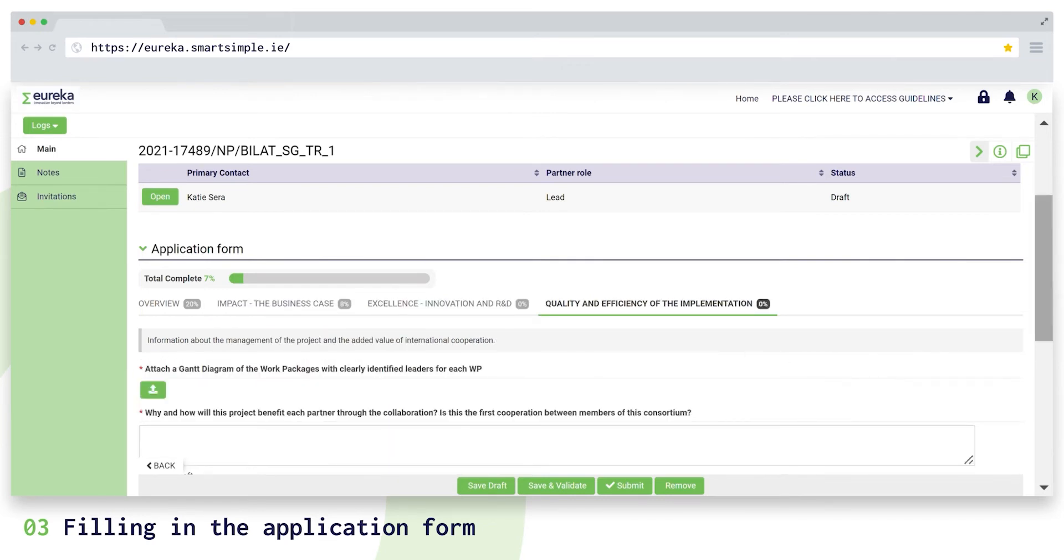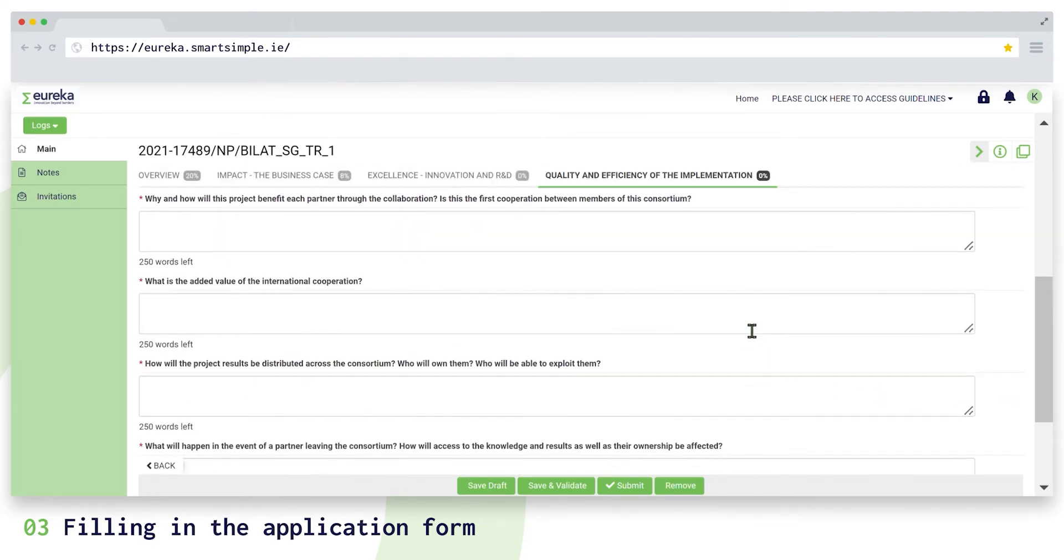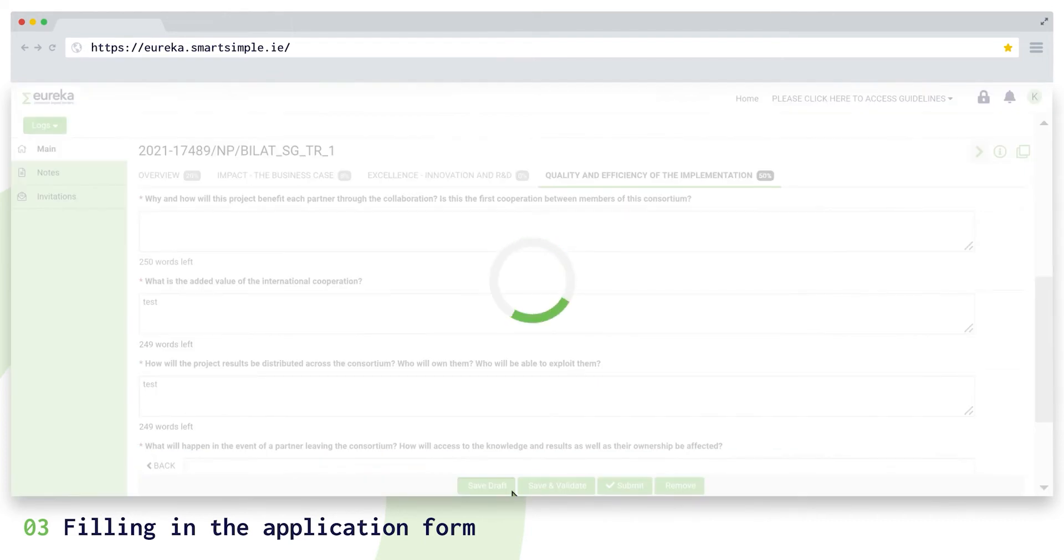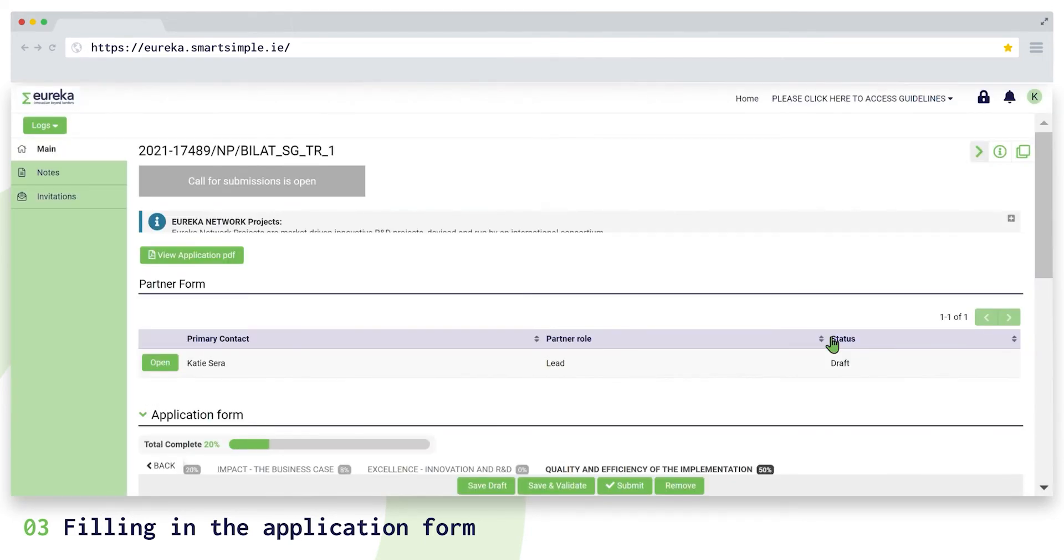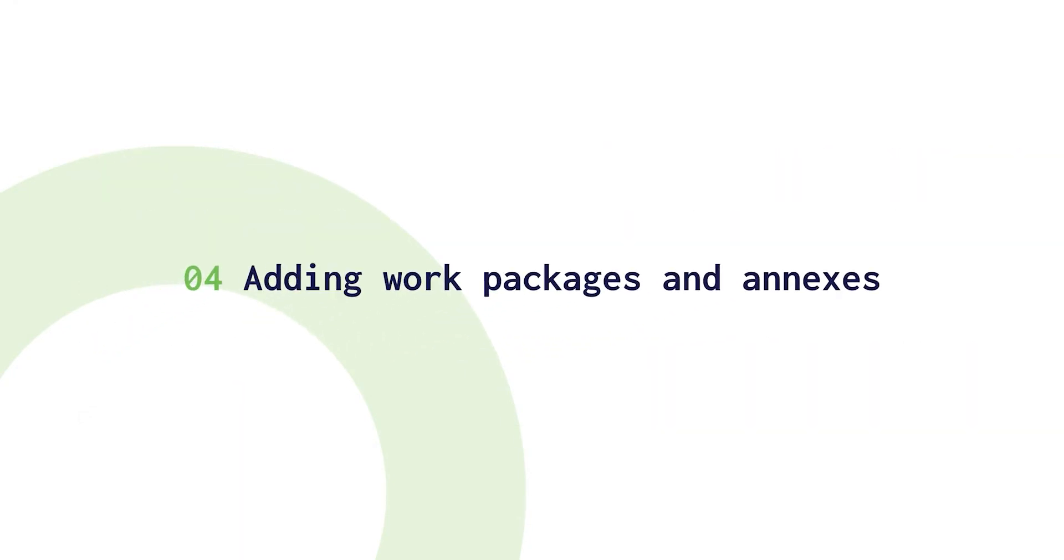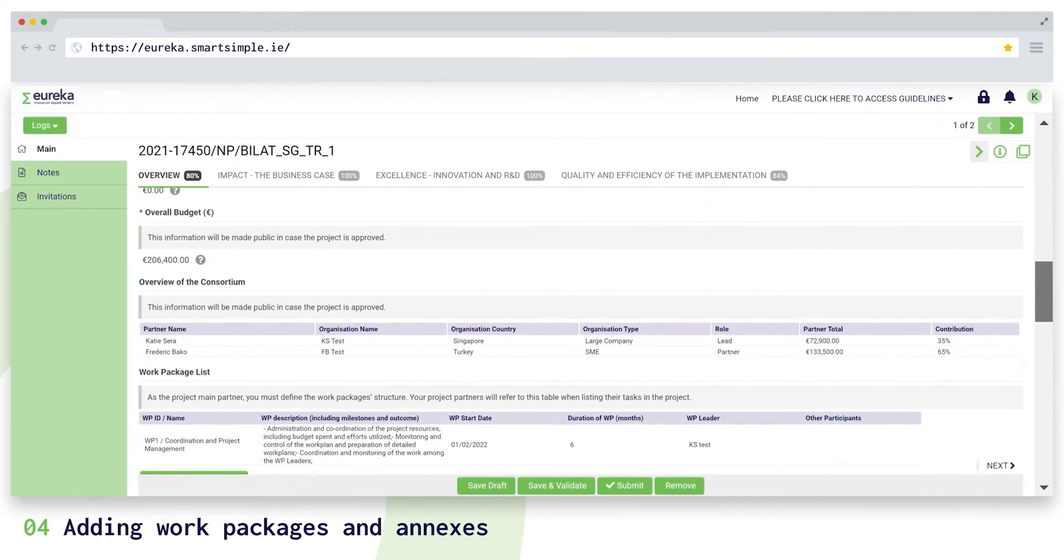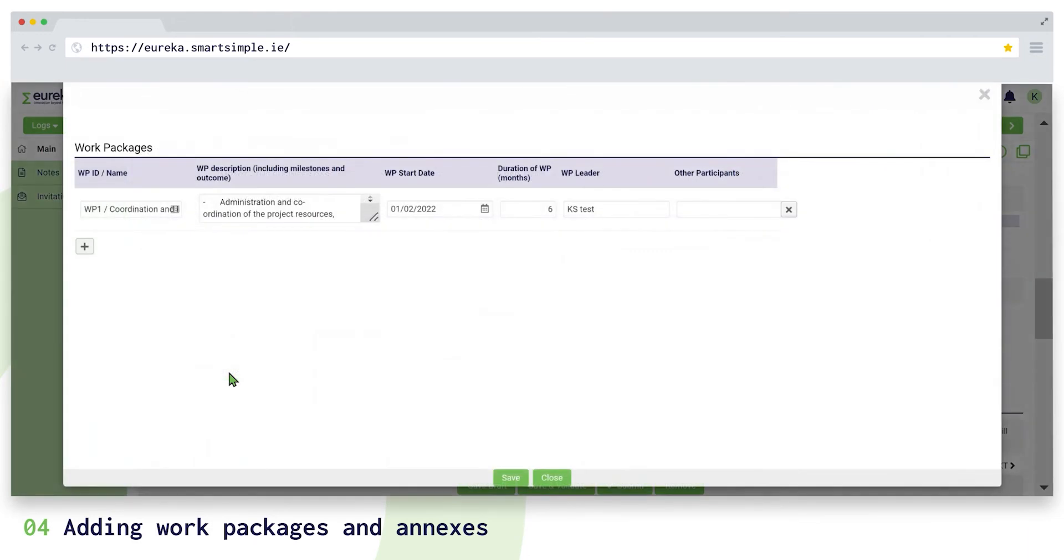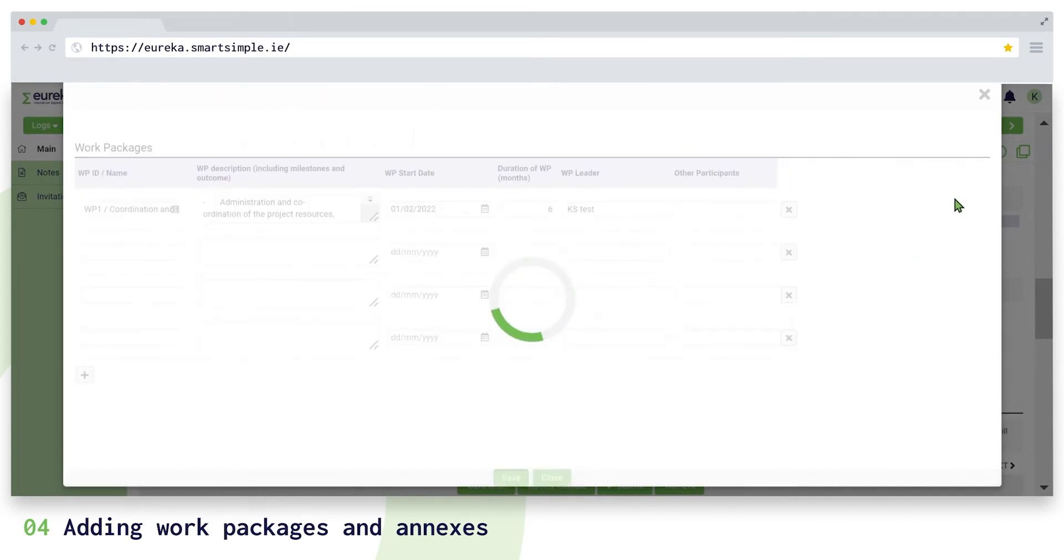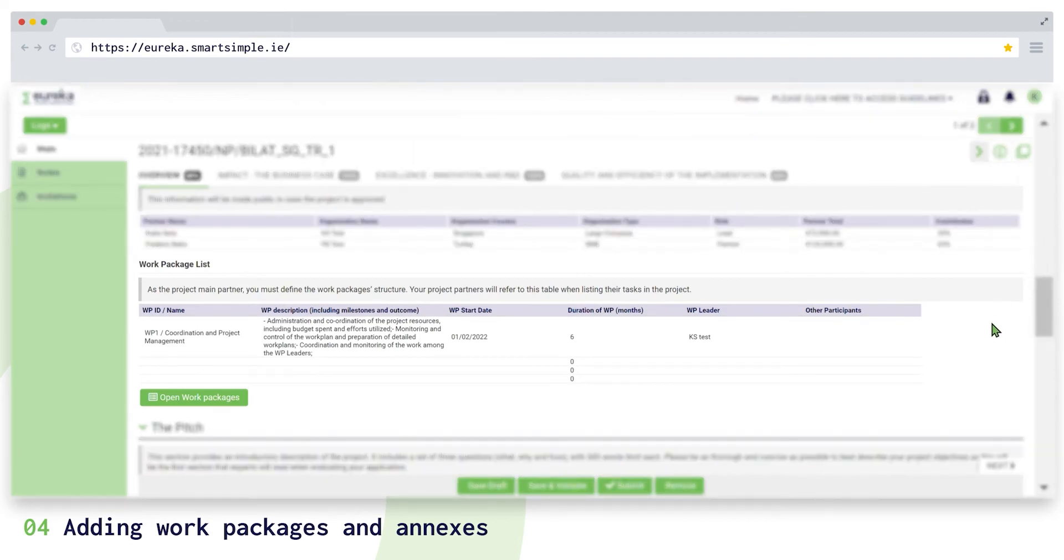We recommend that you fill in as much information in your application form as you can before inviting your other consortium partners. This way they can view the latest version of the application form and see information they need to complete their partner form, for example, the work packages. You can complete your project work packages list at the end of the overview section above the pitch. Click on open work packages and add as many rows as you need by pressing the plus button. Fill out all fields and click save. This table will be visible in all partner forms for your partners to use as a reference to list their tasks in the project.